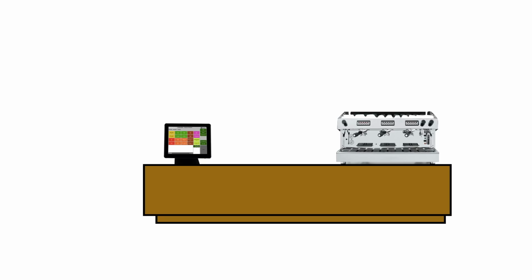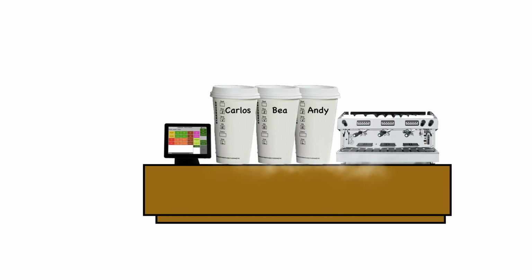And we can do it very simply, just by applying a hard limit to the number of cups that are allowed in this area at any one time. By the way, we've just implemented a Kanban principle, the principle of limiting work in progress of a system. What we've also seen is a clue as to the true nature of a Kanban.